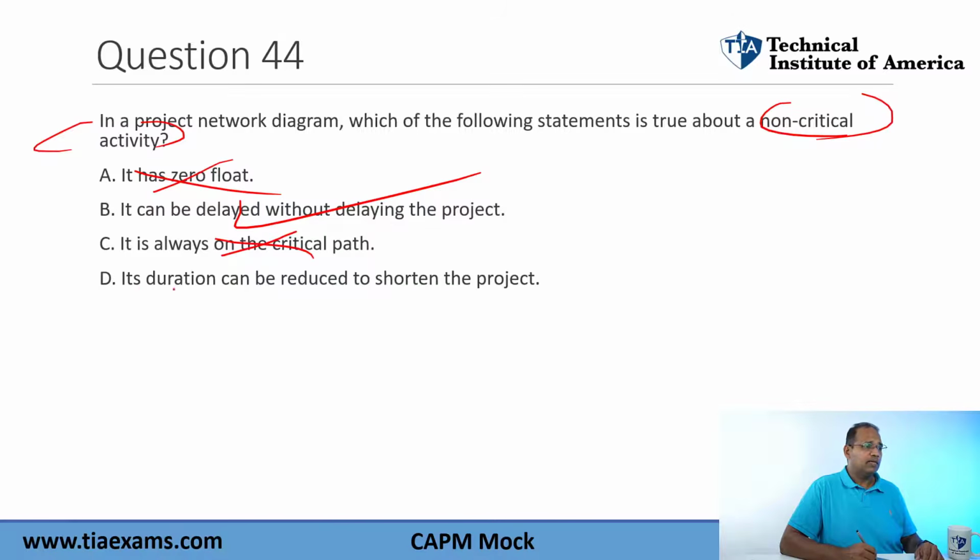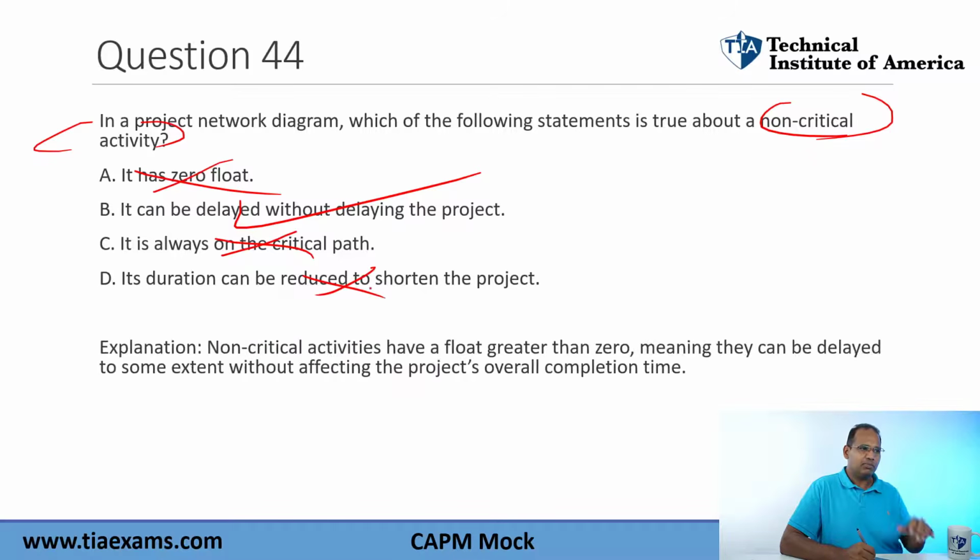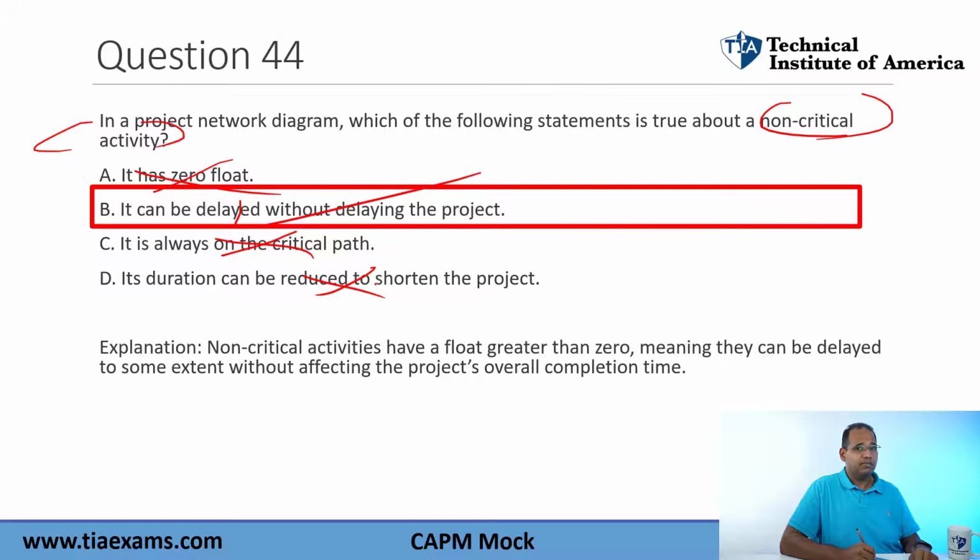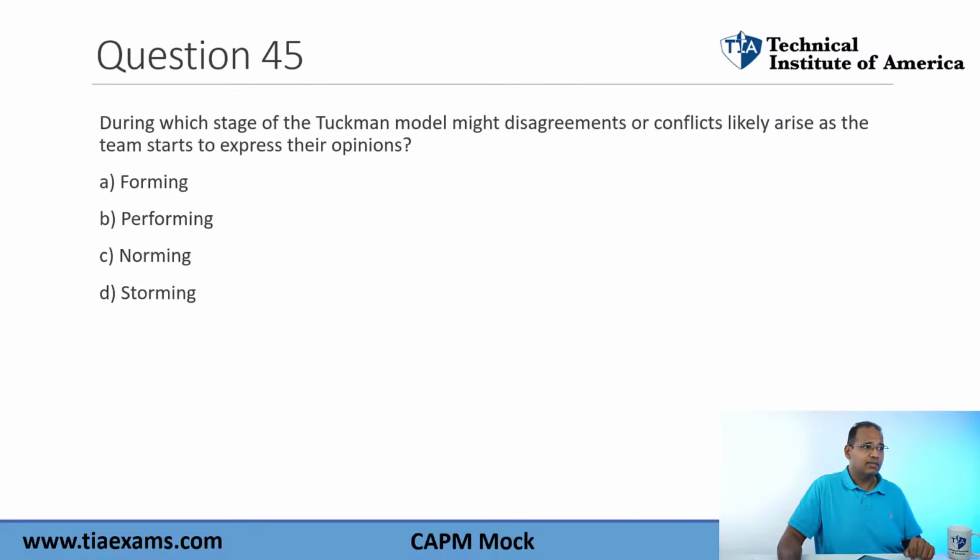No, it's not. If its duration can be shortened to reduce the project. No. If you shorten a non-critical path duration, it doesn't affect the project end date. A critical path activity, though, if you shorten its duration, will generally decrease the project, making B the best answer in this one. All right, don't forget, make sure you practice your critical path. We did cover that extensively in the class.